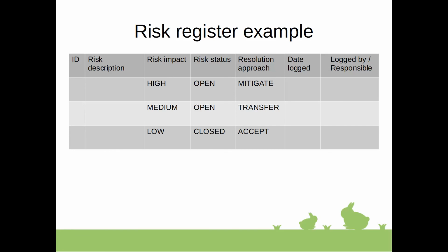Then you identify risk impact towards the project goals. It can be typed as words like high, medium, low, or it can be with assigned values. Then the risk status as of the moment of the review. Essentially, some risks might be already resolved. Some of them might be just ignored. But you can use any status you want for ease of analysis.